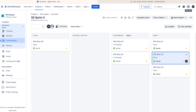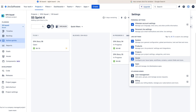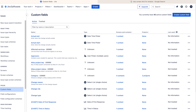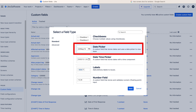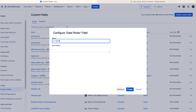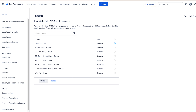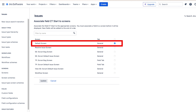If you're lucky enough to have admin rights, go to the settings cog, click it and select Issues. Then on the left hand side select Custom Fields and click on it. Then click Create Custom Field — a select field type box will pop up. The type of field you want to select is Date Picker, so click on that and click Next. Type a name for the new custom field — I chose CT Start as it's going to be my cycle time start date. You can put something in the description if you like but I left it blank. Then click Create. You'll then be presented with a screen asking you to associate your new custom field to screens — only select the Default Screen and click Update. Now repeat this process for your second custom date field but this time change the name — I called mine CT End as it's the end date for my cycle time.